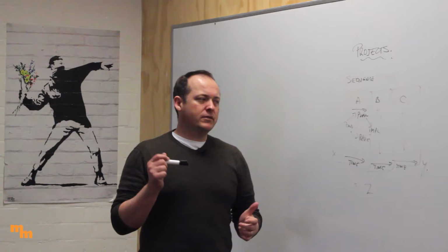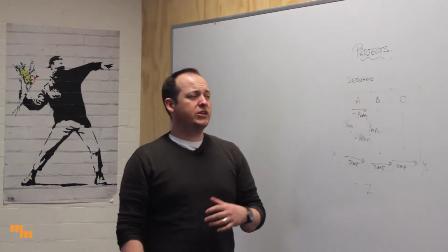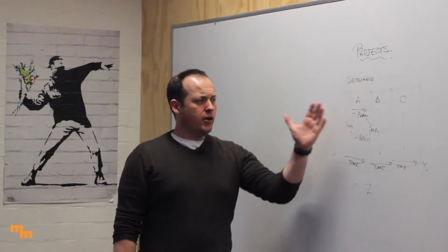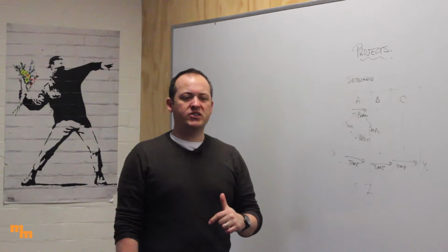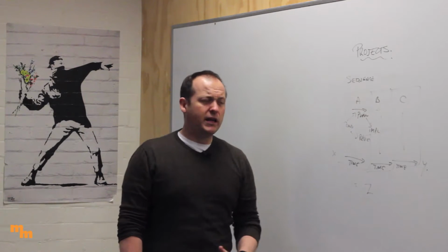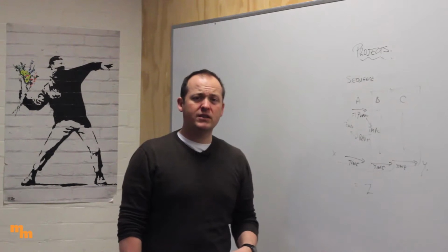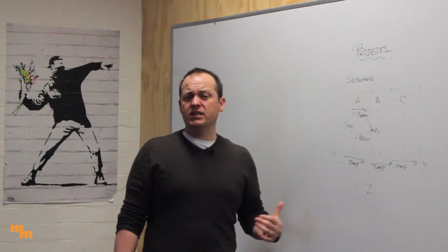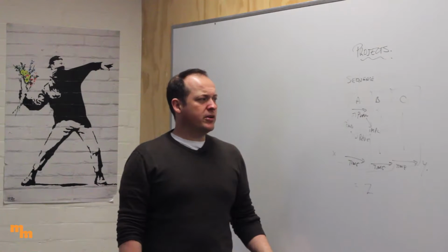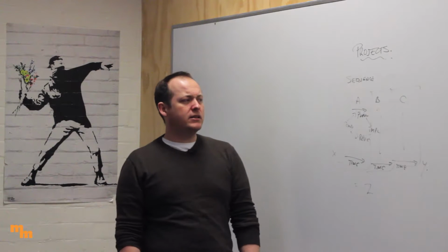All right, so in order to understand this, make sure that you are reviewing similar project activities. So if you've done this in the past, you'll know how long that's going to take. You can start to seek stakeholder advice. You can simulate it. Okay, let's talk it through, rehearsals, that sort of stuff, or go give it a practice run, find out how long it actually takes, do the activity and time it, or seek expert advice, okay? So getting a really good handle on how long things take is really important.